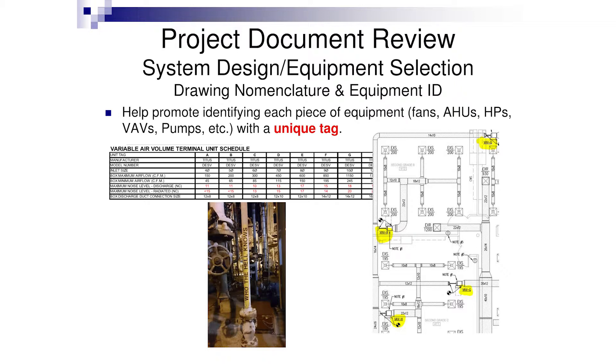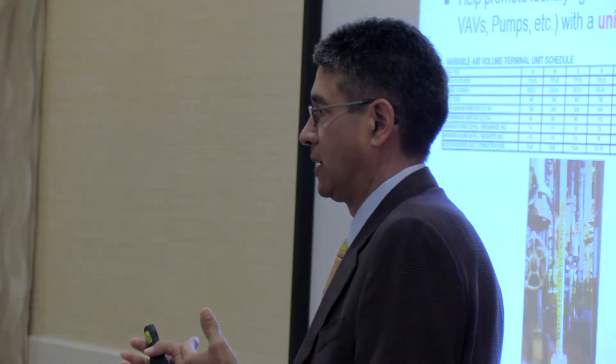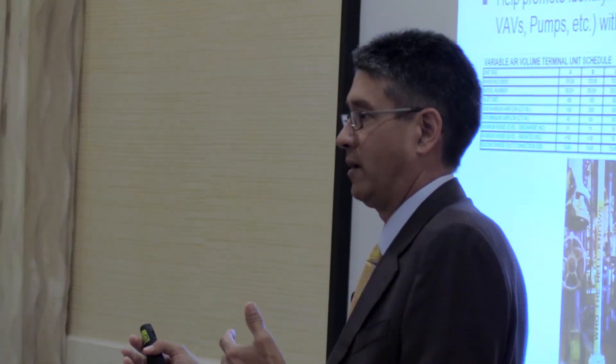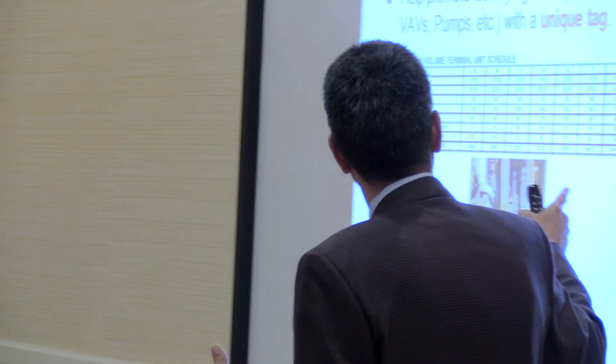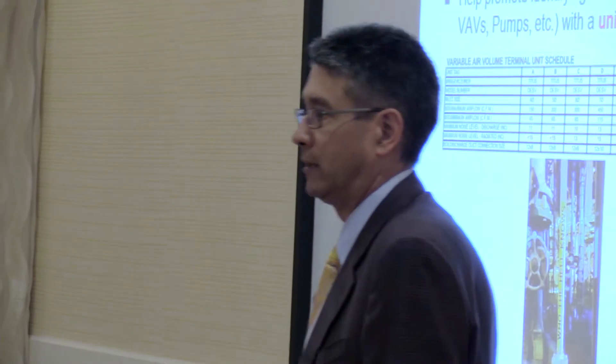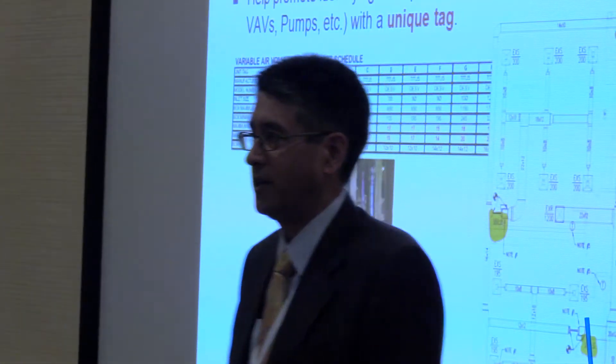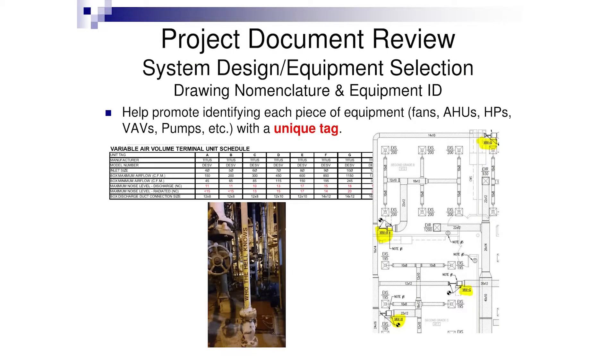One of the things that helps both commissioning, test and balance, and owner usage in the end is unique tags and IDs. When you get to a job and all of a sudden there are five VAV groups not individually identified, it becomes very difficult in the communication process throughout the project. Talking to the controls guy and saying 'VAVG northeast of room 111 isn't holding its calibration factor' — he gets turned around, doesn't know which one you mean. Typically the controls guy will call it by the thermostat room number, while the contractor labels it by where it's actually located, creating all kinds of different nomenclature going back and forth.